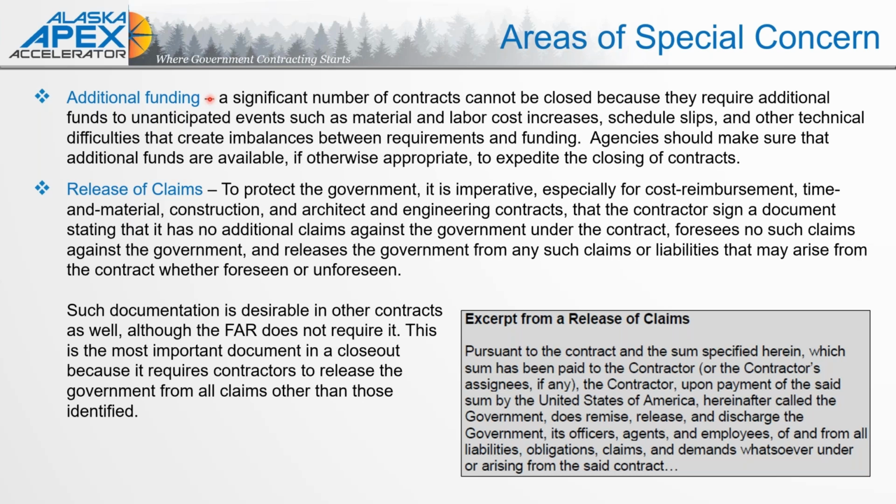So if you had been performing a multi-year contract and we're trying to finalize the cost differential from an activity in option year 1, and now 5 years later you're like, oh yeah, well, you still owe us from this change at the beginning of the contract. Well, the contracting officer cannot necessarily pay you with current year monies. If that activity took place in your option year, they have to find funding from that pool of the year in which that action happened. So if you're in year 5, they've got to go back and find that year 1 monies.